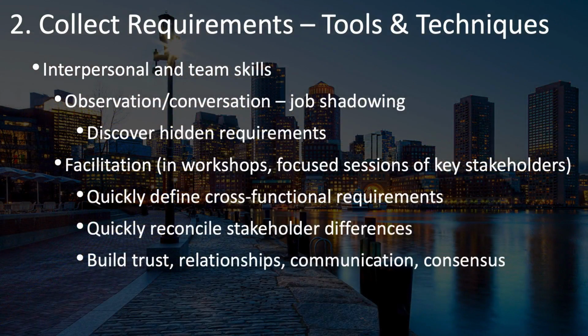Another technique is known as observation, sometimes called job shadowing, in which you watch as someone does their job. This is particularly valuable for jobs that are complex or difficult to describe. You can watch them as they work and record information, write it all down, ask questions. This way, you can learn what their job is all about and get some insights into what the requirements are.